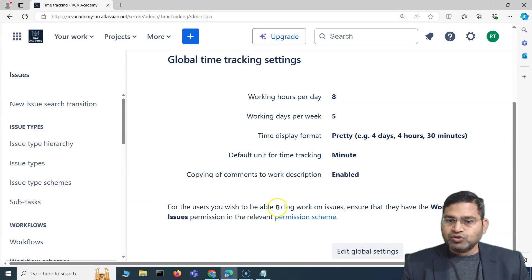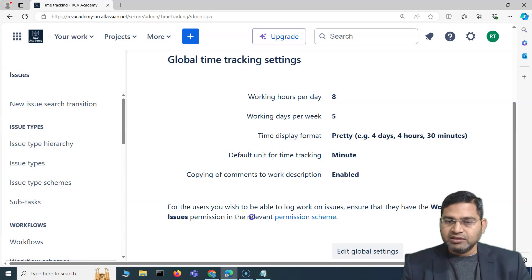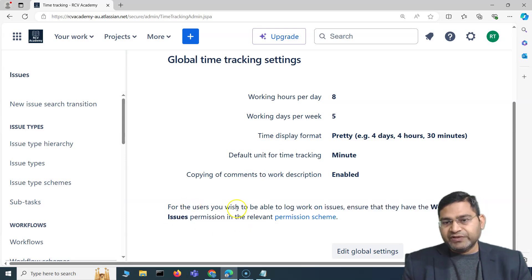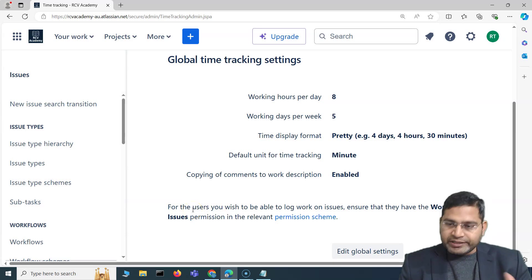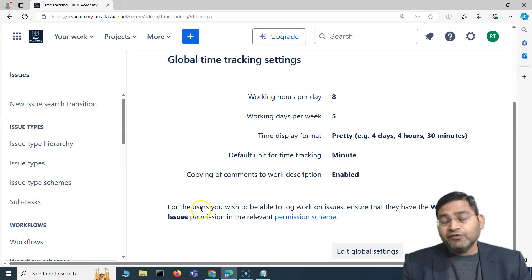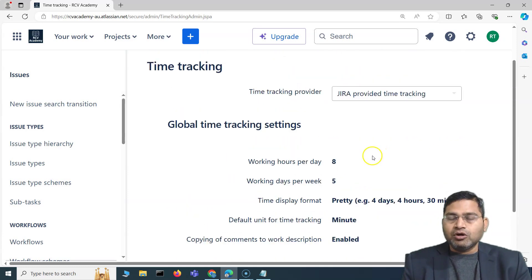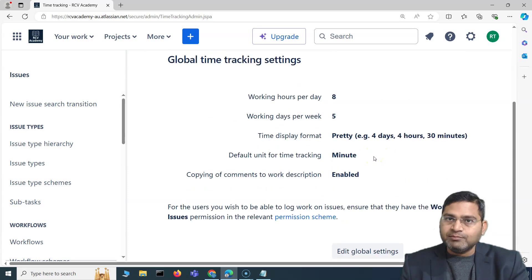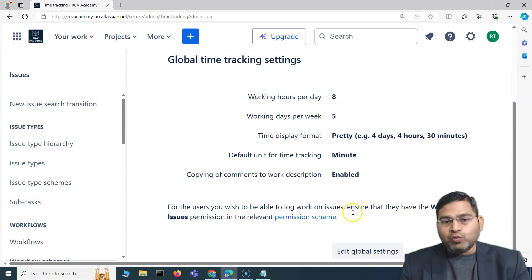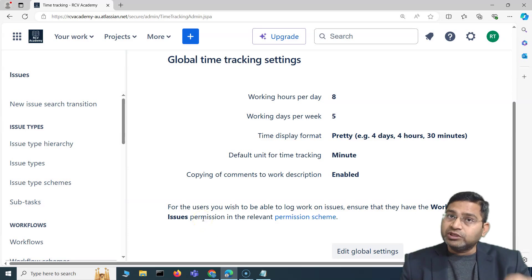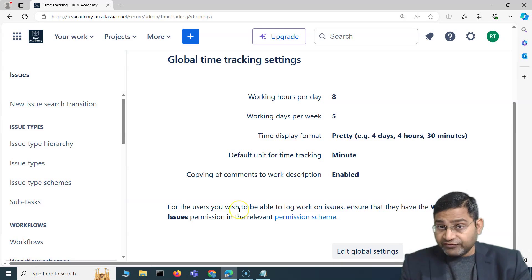For users you wish to be able to log work on issues, ensure they have the 'Work on Issues' permission in the relevant permission scheme. This is an important note and a potential interview or Jira admin certification question: if you want a user to be able to log time on an issue, they must have the 'Work on Issues' permission within the permission scheme.